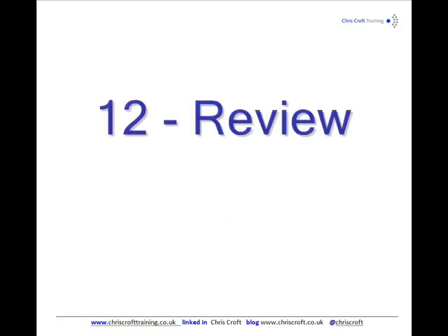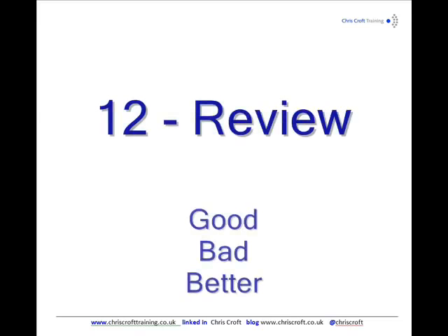And then finally, when you finish the project, step 12 is to do a review and to say, what have we learnt? Usually 3 questions, good, bad and better. So what was good that we must repeat next time? It might have just been luck, but at least we can make sure we repeat it next time. What was bad that we're going to avoid next time and that everybody else needs to know about so they can avoid it too? And what could we have done better?